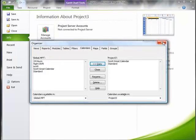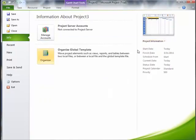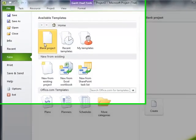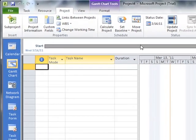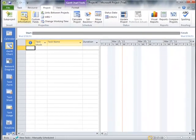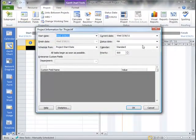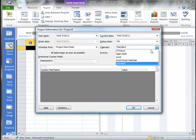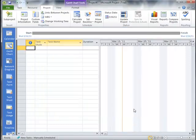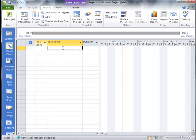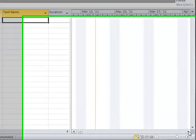And then you will see that once I've done that, and I go to Create a New Project, that if I go up here to Project Information now, my calendar could be Scott's Great Calendar. And so any tasks that we have that are going to be used with this project will now inherit all the changes that we've made in Scott's Great Calendar.